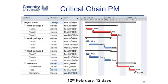I'm using Microsoft Project to demonstrate this, although to do real critical chain project management you need specialist software. I've got a simple project plan here with a few work packages — work package one, two and three — and when they're each complete, we can assemble this item. I've done this the traditional way by allocating the resources to the tasks, and the computer has decided that the first work package is critical, shown in red. We can clearly see there's going to be a resource problem because Alex is doing task one, task four, and task seven on the same day. The total project is 12 days, but we know this can't be achieved because of resource issues.